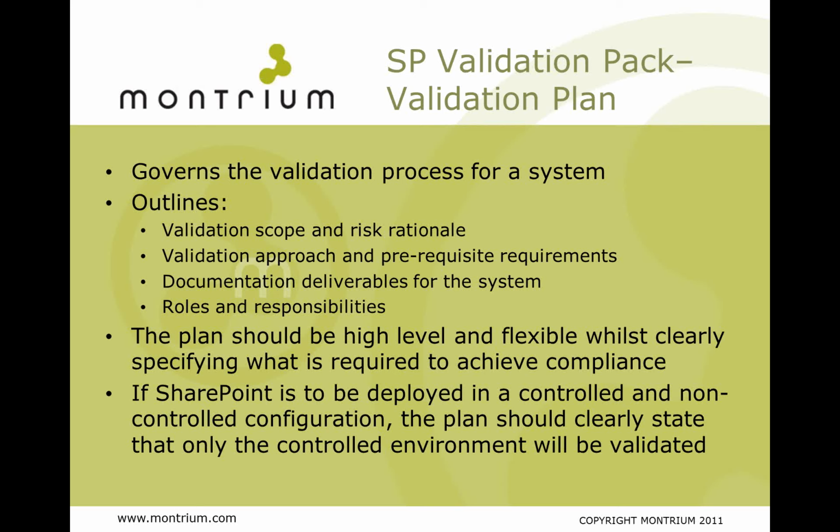The validation plan is a very important document because it really describes the procedure that we're going to be following to validate our solution. And so it really gives us a validation process. It outlines the validation scope and risk rationale. It outlines the validation approach and the prerequisite requirements. So, for example, within the context of SharePoint, a prerequisite requirement would be having SQL Server installed and qualified, having Windows 2008 installed and qualified, having qualified hardware in place, etc. It could also be prerequisites in terms of training for the people that are involved in validation.